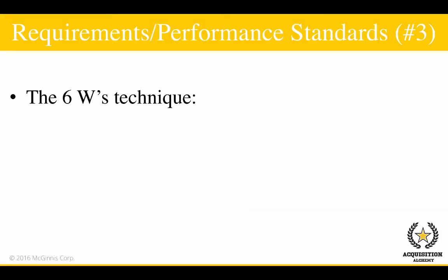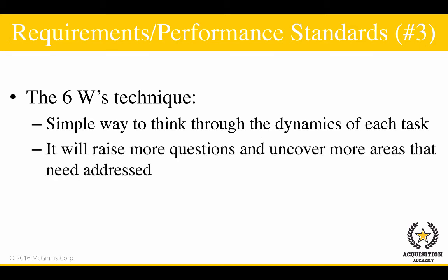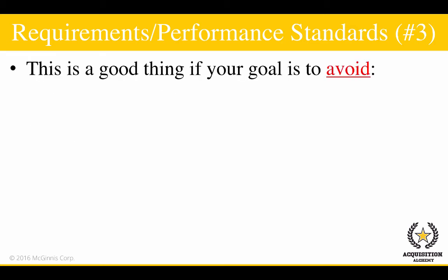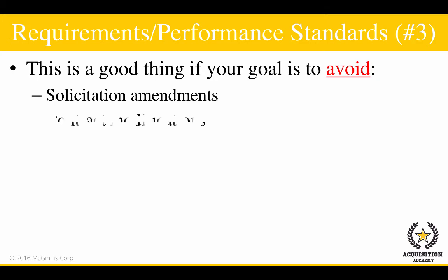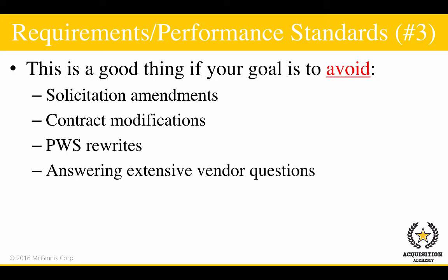Using this technique is a simple way to thoroughly think through the dynamics of each task within your PWS. It will almost certainly raise more questions and uncover more areas that need to be addressed within the requirement in the PWS. This is a good thing if your goal is to avoid solicitation amendments, contract modifications, PWS rewrites, and answering extensive vendor questions about unclear or conflicting work descriptions later in the acquisition process, when the cost of change is higher and more time-consuming.